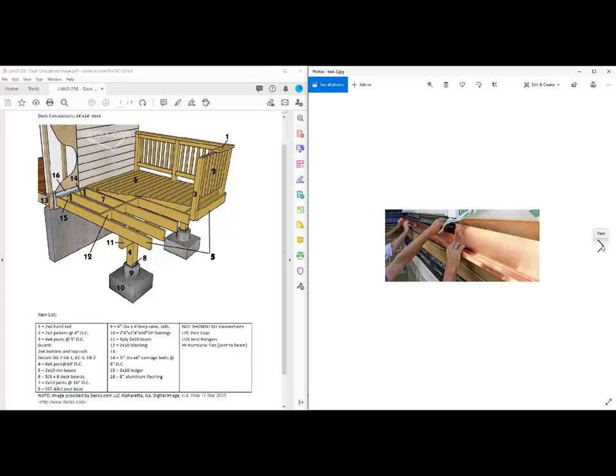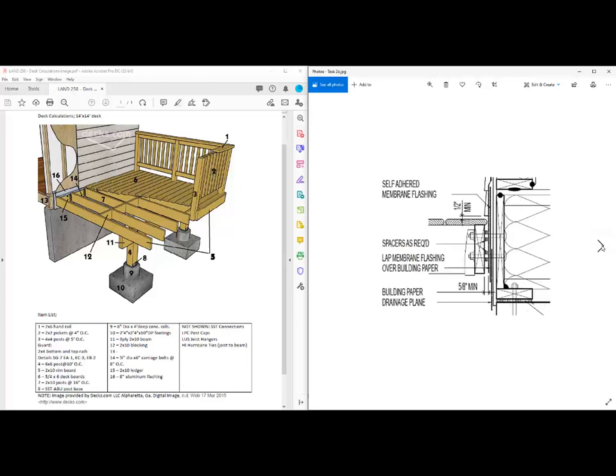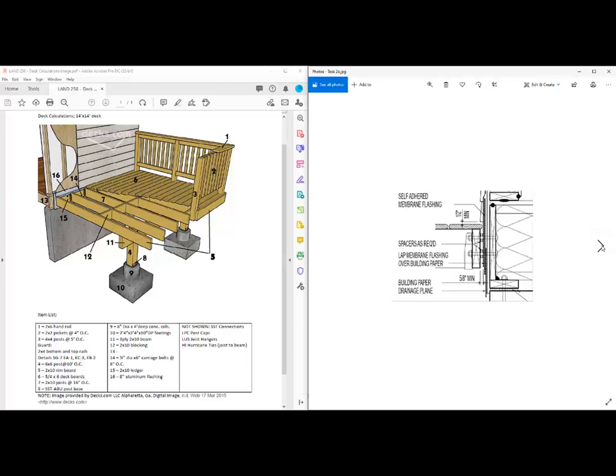Task number one is exposing the siding. Task number two is installing the flashing. In this example, the flashing is brought right through and down along the exposed sheathing house, and then the ledger strip is installed. Depending on which technique you're using determines the order of operations.